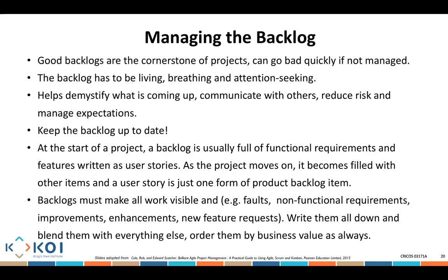So what you need to do is get all of these extra backlog items that get created. You need to think about them and ensure they are creating the right priorities. So if someone added 10 extra features, are these new features more important or less important than all the other features that we have? If they are more important, then you need to reprioritize all of these items in the backlog.